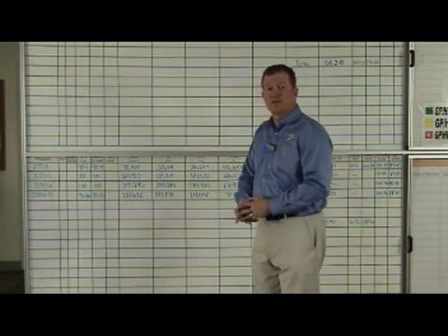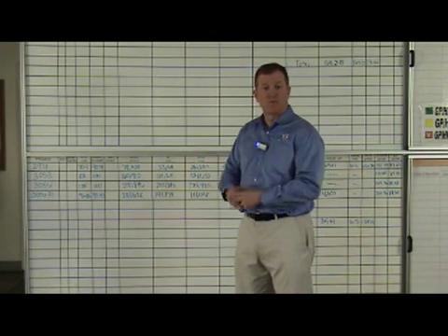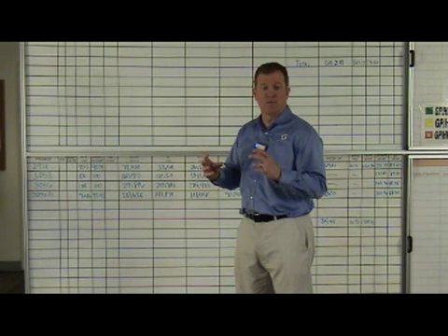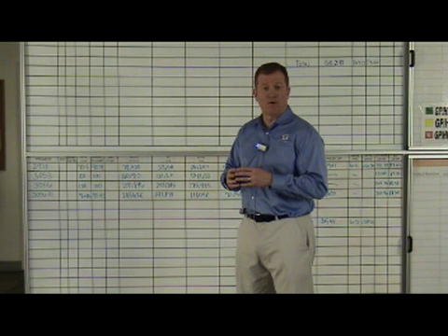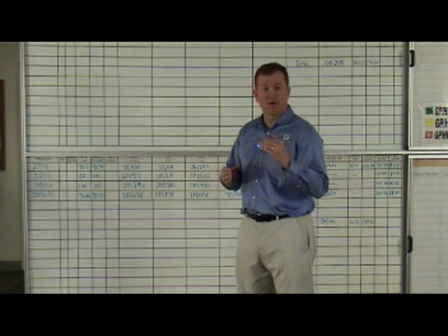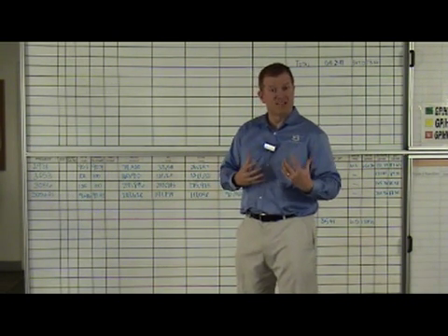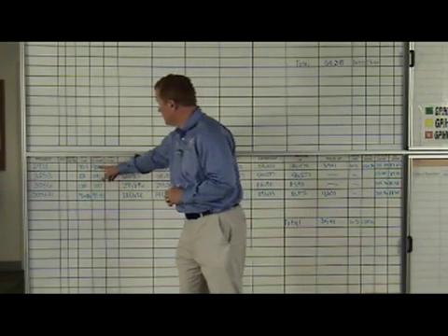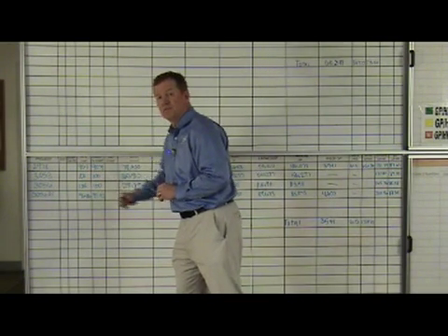Then once we get our project gross profit, Builder Bob, our project engineer, has to estimate what percentage we've completed on the job in terms of labor. He goes to a database, an hour tracking system we have, looks at his labor categories, also evaluates his Gantt chart to figure out what percentage we're at in completion. On this job right here you can see he's at 95% complete.